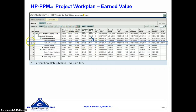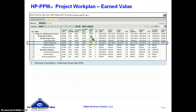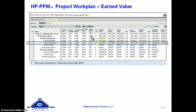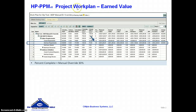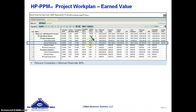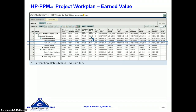Basically, the planned hours of 100 would indicate that 45 of these hours weren't part of the plan, which may be a result of unassigned work or unassigned resources doing work. A lot of this depends on the configuration of the system, which means that when you get done you may have 145 hours. It might also indicate that you're that far off on your estimate — so if 75 hours represents 30%, when you get done you're going to have 250 hours. In either case, this indicates there's a problem with this task that the PM needs to look at.